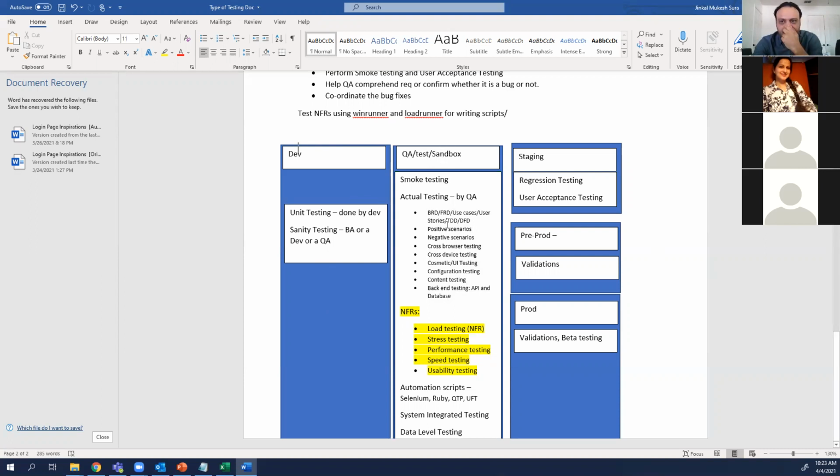So remember, in waterfall we had initial phase, requirement gathering phase, design phase, development, testing, and implementation. Correct? So everything that happens in dev environment, that's development phase for that project. Everything that happens in QA environment, that's all QA testing. That's a testing phase. And everything that you're going to put in production here, that's the production launch implementation. So those 3 steps of waterfall happen in these 3 different environments: dev, QA, and prod.